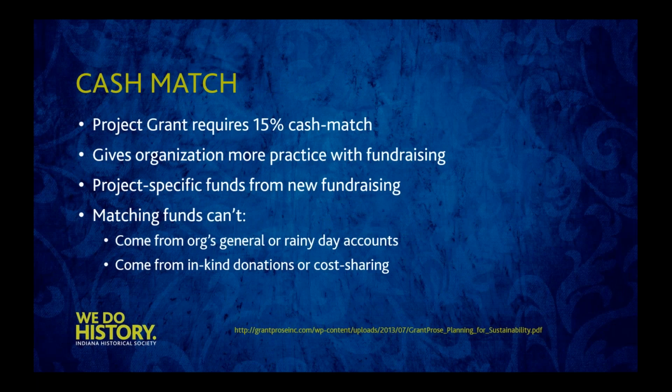So the project grants require a 15% cash match. These matching funds must come from new fundraising, and it needs to be actual dollars. It can't come from in-kind donations like use of space or volunteer hours, and it cannot come from cost sharing. For anyone unfamiliar with cost sharing, this is where an applicant contributes resources like staff time or equipment to a sponsored project. These funds should not come from the organization's general or rainy day funds.